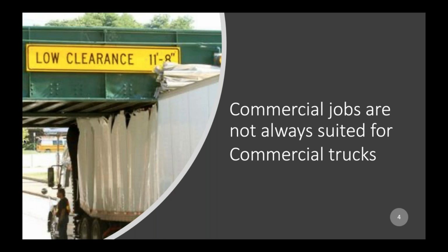Your legal height on semi trucks and anything you should be pulling would be 13 foot 6 inches or less. Some parkways have low clearances. They don't allow commercial vehicles on there for that reason. And then when you get into city streets, a lot of times, just as with this one, you'll have a low clearance.